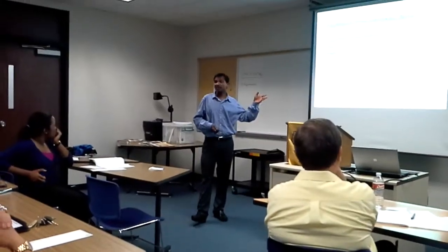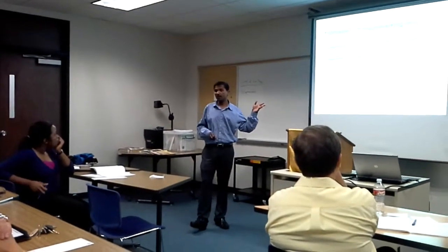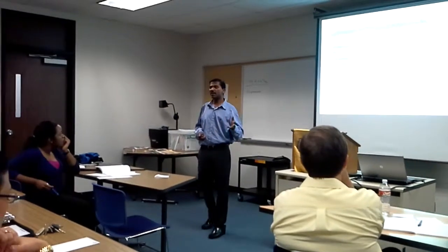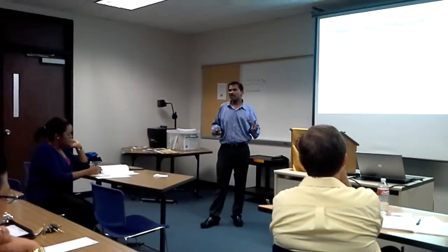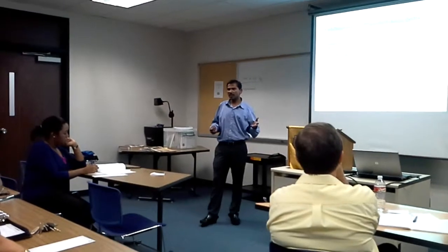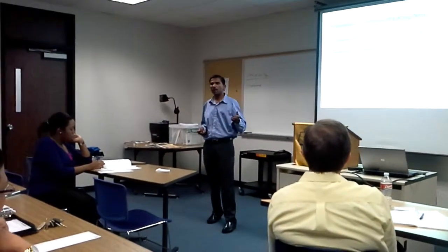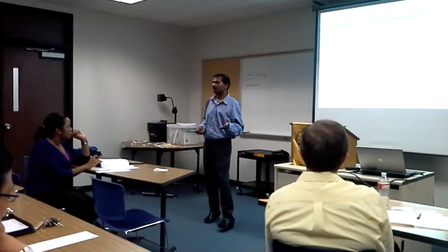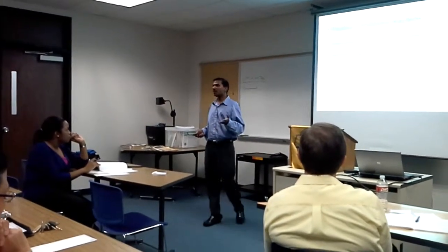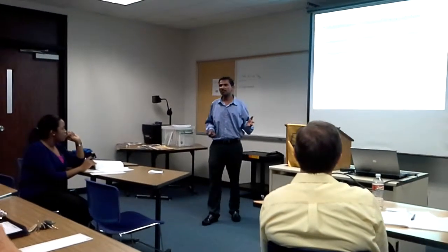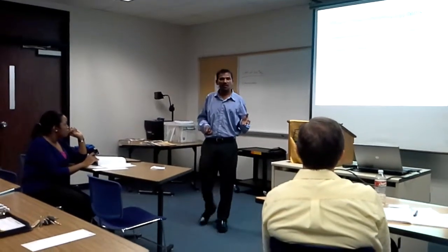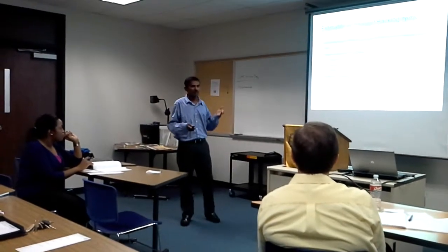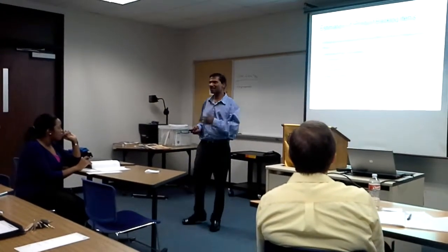We also estimate these product backlog items. Usually we estimate based on the complexity of the unit, the feature, that you are going to work on. There are different types of estimation techniques, like the large, medium, small technique, or you use story points, or you use the number of hours or how many days it is going to take.